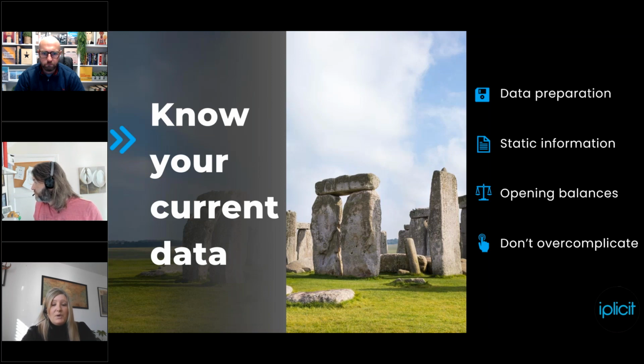Great. But again, if they've got a balance on them, because you've got a bad debt or something along those lines, is it something that you've got to make sure that you've tidied up, either in your legacy system, which we advise, so you're not bringing over any unnecessary records just for an opening balance that you're probably going to write off next year. So try and tidy things up in the current system as best you can, so you're only bringing over the relevant data. Same with projects, same with stock. When there are records that are used across the wider organisation, again, engaging the right people to identify the relevant codes that come over. So there's a good conversation.